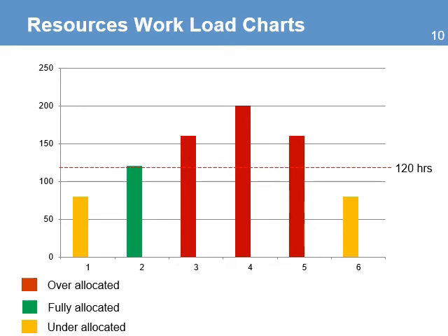When you assign your teams to do more work than they can do, the result is going to be poor quality in the outputs, delays, and cost overruns. As a result, you will have problems with motivation, people overwork, and dissatisfaction with their job. Make sure that you identify the limit and that nobody is beyond that limit or even below that limit.